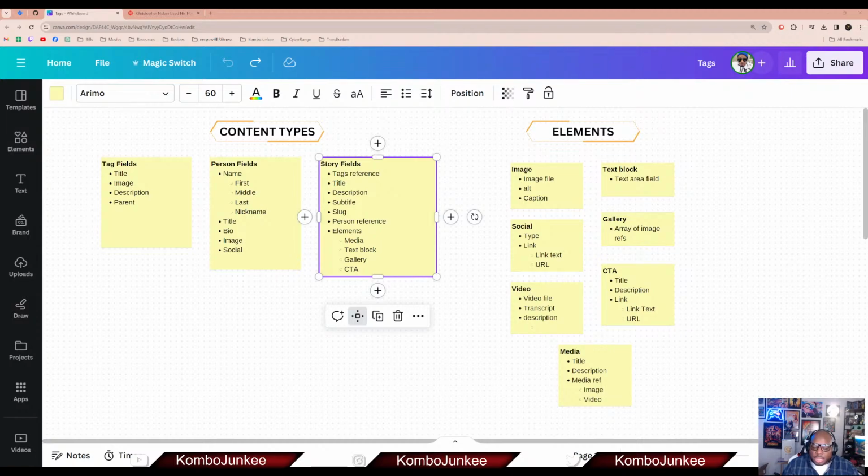The first ceremony that I should mention is probably the backlog refinement, or the grooming ceremony. What that ceremony is for is it allows you to look in your backlog and see what work exists there. You take work from that backlog, from the 3 tickets I mentioned, and you flesh them out with details. So for that first ticket, the one that's like solve the top layer, now you have Rubik's Cube experts or developers telling you what it takes to solve that one ticket.